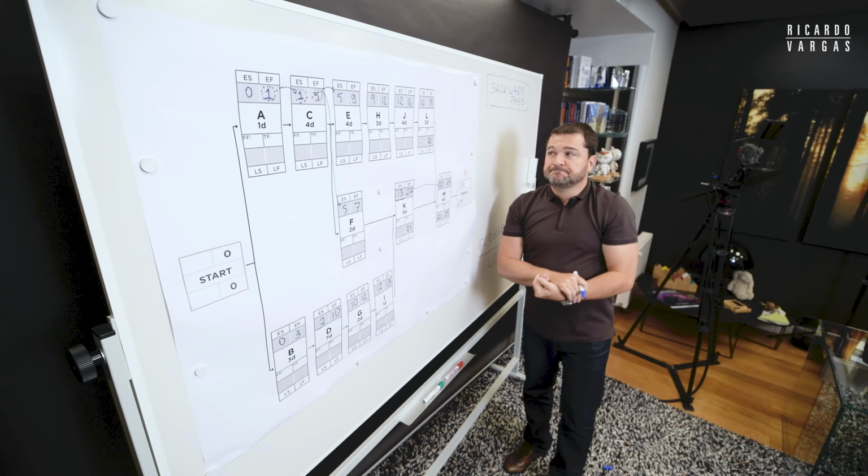Okay, now what I need to do? I need to do the same here, 13, that is here. Imagine that this arrow is moving this direction and this direction. So what happens? 13 comes here. Then 13 minus 2 is 11. 13 minus 1, 12. 12 comes here. 12 minus 2, 10. 10 comes here. Remember, this arrow, 10 comes. 10 minus 7, 3. 3 comes here, 3 minus 3, 0. Okay, hold on. We still need to do these two here.